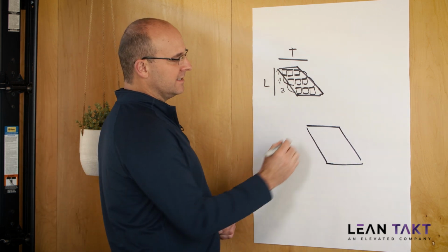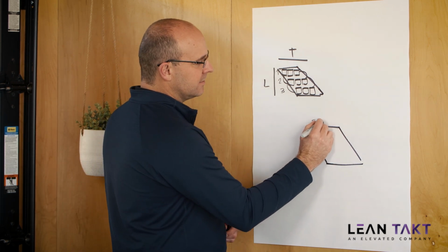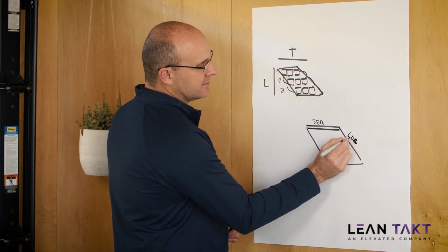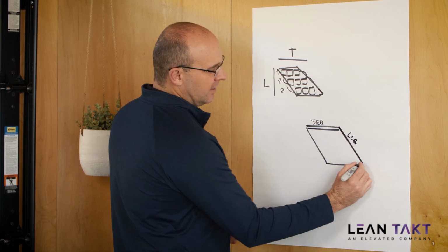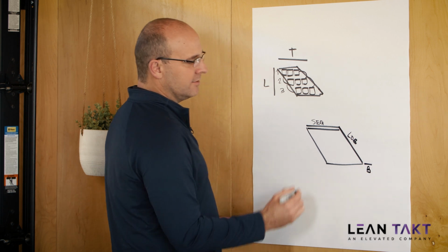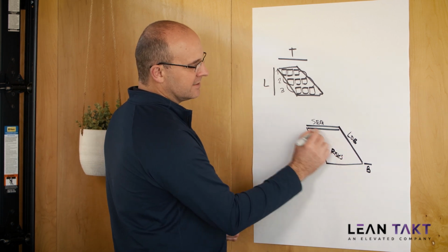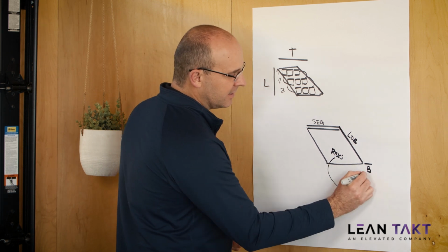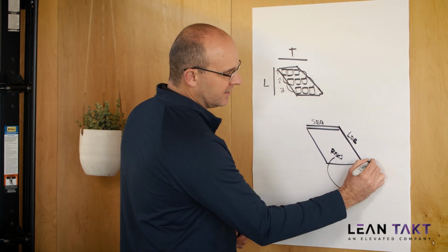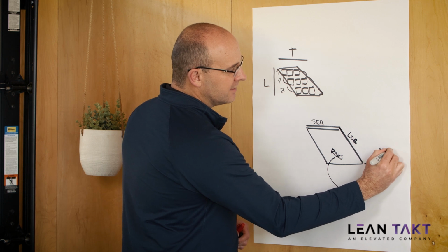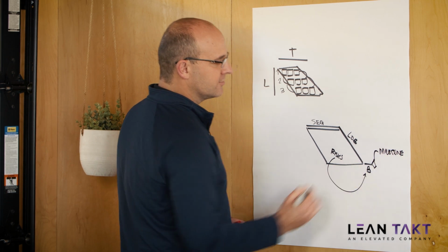This phase is identified by the sequence in the horizontal, your line of balance in the diagonal, and your buffer at the end based on risks. However many risks you have inside this phase need to be covered by buffers at the end of the phase. That will then allow you to target what's called your phase milestone that you can track to.